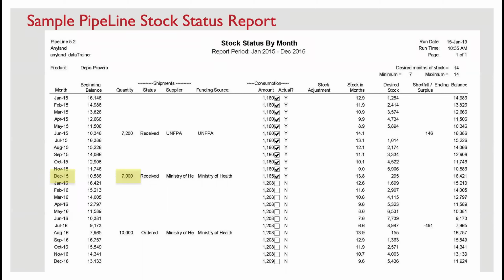future. So, for example, this shipment, which was to arrive in December, we would have had to have placed it back in February. After securing approvals and allocation of funds and getting shipper supplier bids and doing the contracting, we may have actually placed the order in May. So there are steps that take place between the time when you plan the order during the quantification and supply planning process and when you actually place the order.